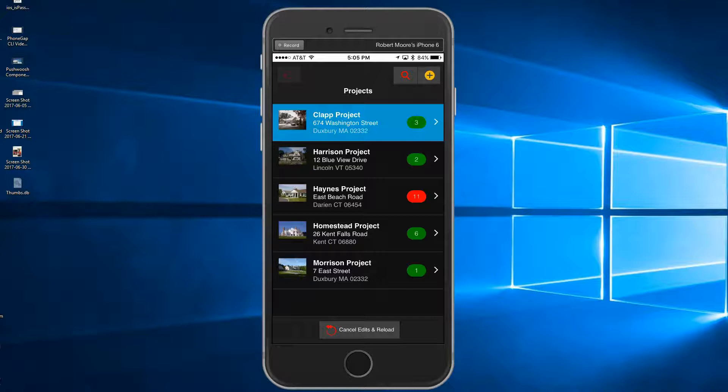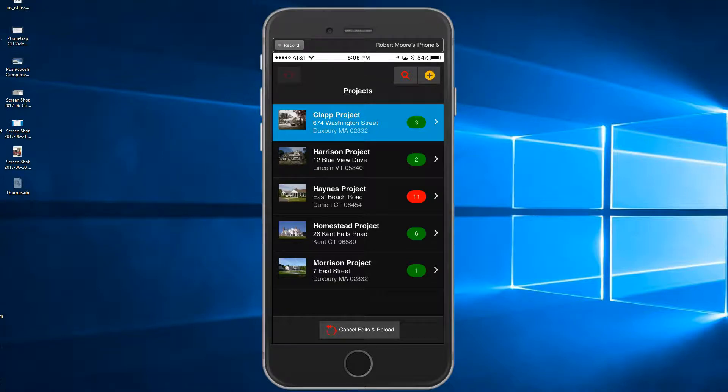The project punch list is a very important part of any large project. Punch lists are a very effective way to make sure that large projects are completed in a timely manner. They provide a method for all parties to easily understand what needs to be completed and by whom. They provide an easy to understand communication medium for the homeowner, the builder, and the architect when closing out a job.